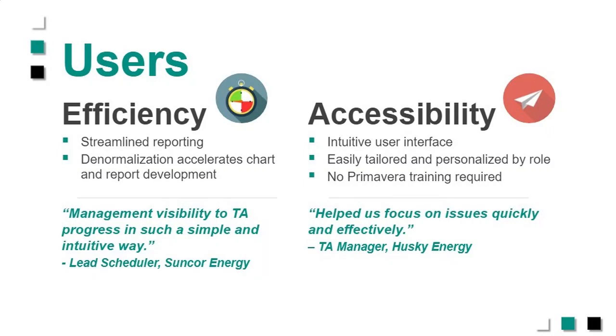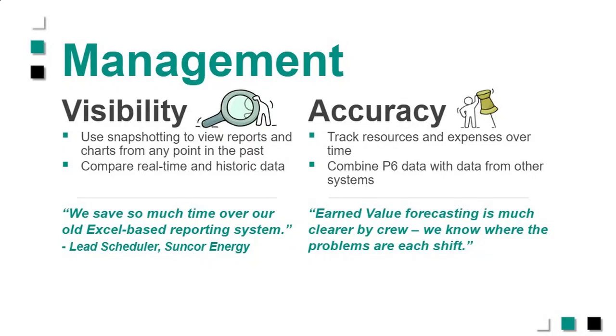An inspection coordinator doesn't need hundreds of pages of Gantt chart. They just need their inspections, and you could give them some float, so they have an idea of what's priority. That could be another one. And you can color code that too. You don't have to give them the float because they may not know what that is. So you could color code the boxes. Red is like you've got to be there on time. Orange could be less on time, a bit more wiggle room. So it's very easy to change those sort of priorities so it's clear.